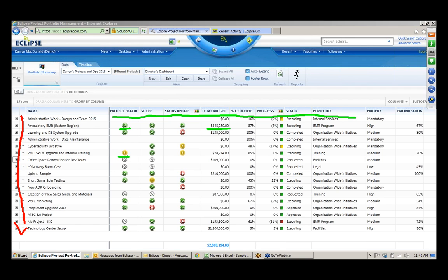The other thing we're also able to do here is get some additional visibility into how this project is aligning with our corporate plans. Now, one way you might do that is with prioritization. Here you could take the approach of just a stated high, medium, or low priority. Or you could go one step further and actually have a score out of 100 that's determined based on a scorecard with criteria that you define, with scoring ranges that you define, with weights that you define that arrive to that value. So all this together gives you the visibility to make sure that you can see all those projects, make sure that you're doing them right, and make sure you're doing your right projects in the first place, to make sure you're maximizing those investments in terms of dollars and resources as well, to be able to take on the right projects.